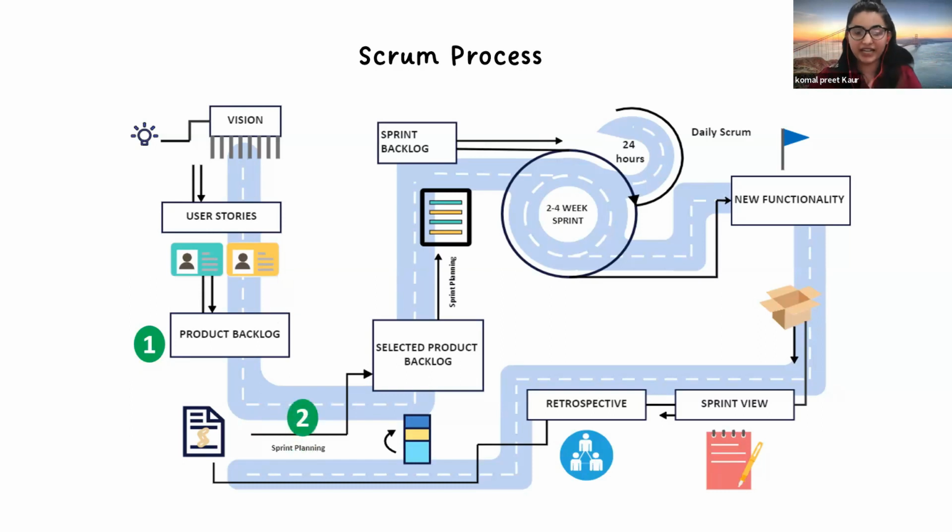The second process is the sprint planning. So here comes our overall Scrum team: Scrum Master, product owner, and our development team. They come to the same table. So you remember in the Scrum, even that 8-hour meeting. So this is what will happen. They discuss the first sprint backlog there. That will be our next step. From the product backlog, let's take a small chunk of features and put it in a sprint backlog. That is also mutually decided and agreed by everyone, right? Developers and owners. Because actually the product owner is the one who does the market research and defines the product vision. He knows what is going on in the market and what he wants to develop.